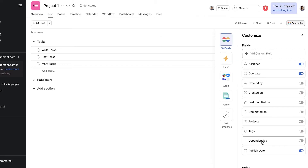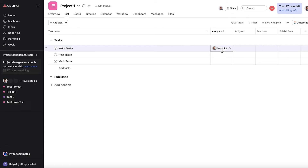I also ran into some trouble with assigning tasks. To avoid confusion on responsibility, Asana allows only one assigned user per task. However, that becomes frustrating if that person is unavailable or if tasks include multiple people. There are workarounds available to help keep moving things forward, but it was still an obstacle.